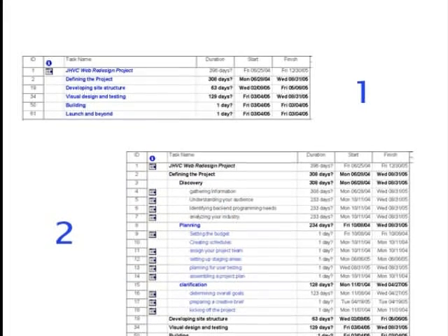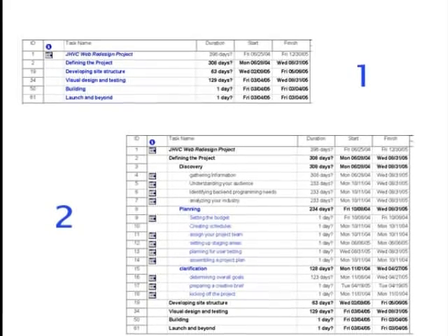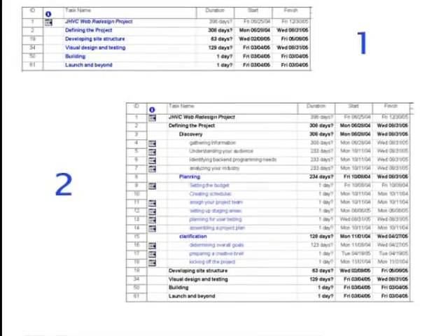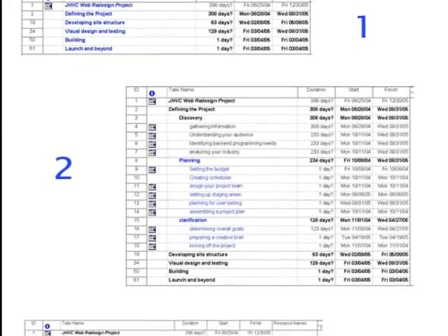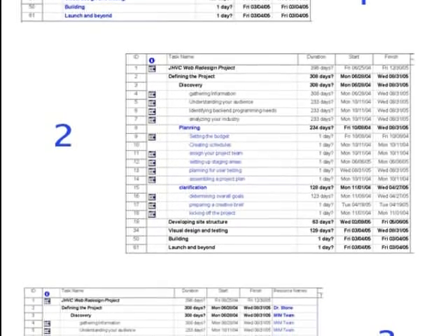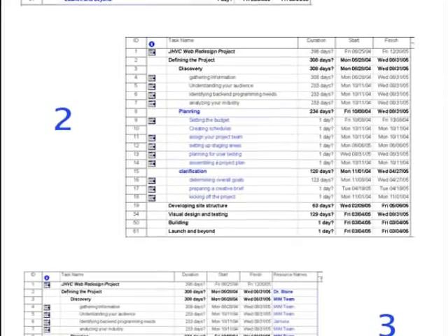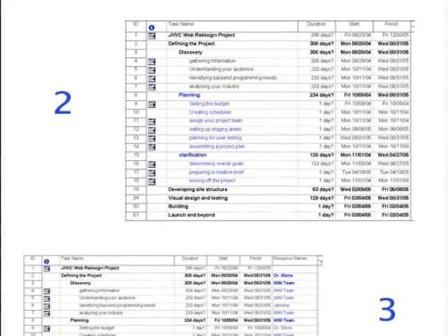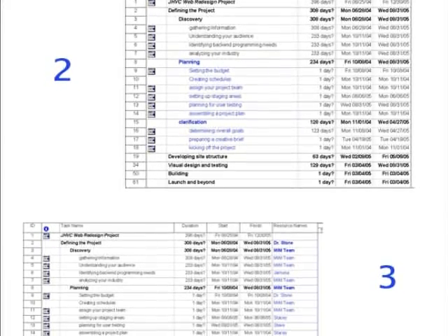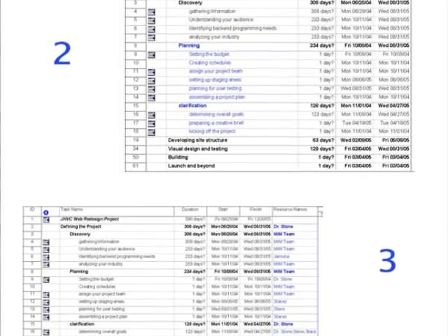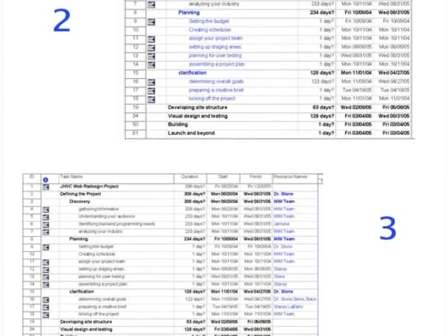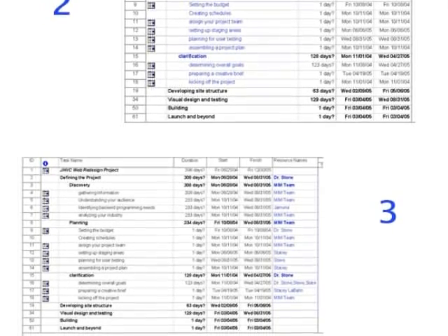Once a project is identified, a case study delivered to the class, the important preliminary tasks will be defining the scope. Scope is the start and end. Developing your game plan, and meshing the scope and the plan leads to subtasks. Then ordering and assigning the tasks to members of the team. Really, it's not that complex. The deliverables are the results owned at the end of the project, and the project framework tasks discussed: defining the scope, developing the plan, defining the subtasks, and then ordering and assigning those subtasks are the structure for organizing your project.